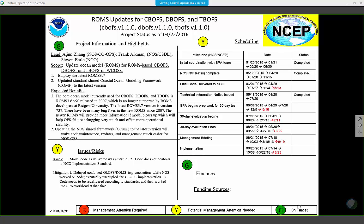Bill, the way I kind of view that is it's the risk you take going deeper back into the development cycle, but the payoff in general is once things are ready, it's a much faster flow because you have the standards worked out earlier in the development process. Yeah, so I get it. I'm just trying to do an assessment of how much rework we end up doing, because part of our intent for the revised implementation process is to avoid the need for rework.